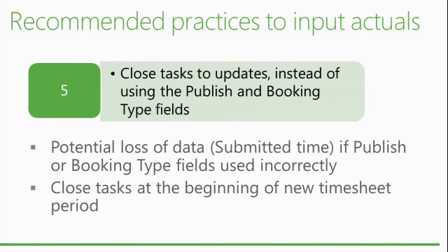You could select a subset of tasks and publish it, and then it was very difficult to know what was published and what was not published, and when, and who is the owner. It was a nightmare. So now you have this flag. But this flag is really to prevent the assignments from showing up in PWA. If it's not published, it means it doesn't show up in PWA. That's all it means.